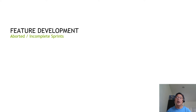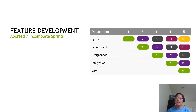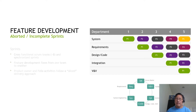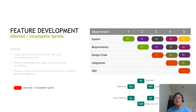Contingency planning should typically account for aborted or incomplete sprints. For example, if design and coding were not completed in a given sprint, there is a delay of one sprint. Delays like this tend to propagate to the validation phase.